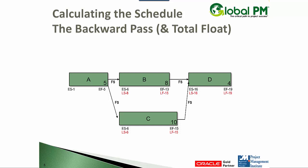Now what about A? You may be looking at it and saying it can slip a little bit because B has some flexibility or some wiggle room. And I say, well, look at activity C. And then you immediately say, okay, yes, it has no flexibility. So the latest it can finish is five. And the latest it can start is one.